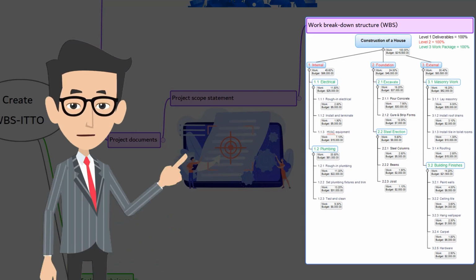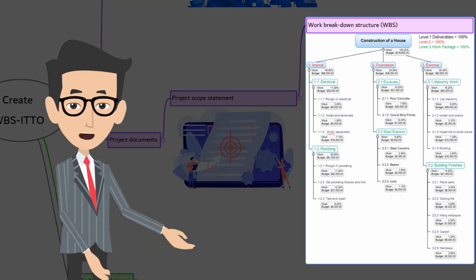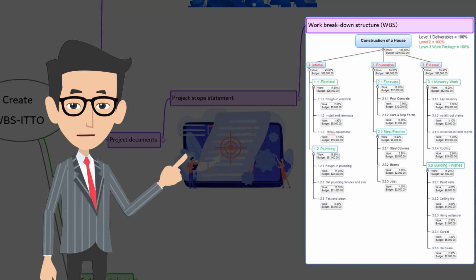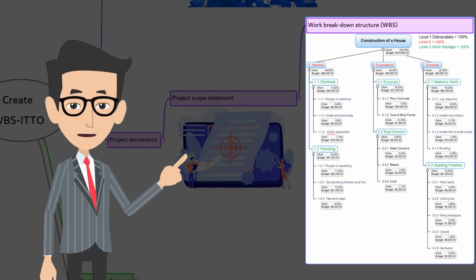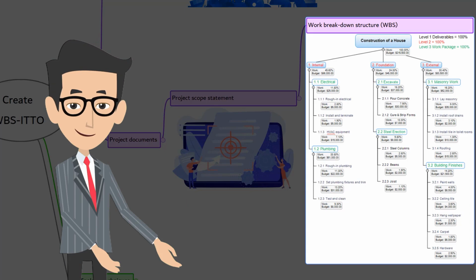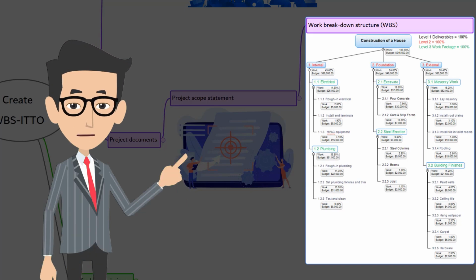Then how do we do it? Since there is no experience, we start listing down the activities as it comes to mind. You may discuss with your friends, family, and you list down all the activities. Later, the activities are put in sequence and similar activities are grouped. That's exactly what we do in a project. Bringing activities in sequence is called, by its name, activity sequencing.